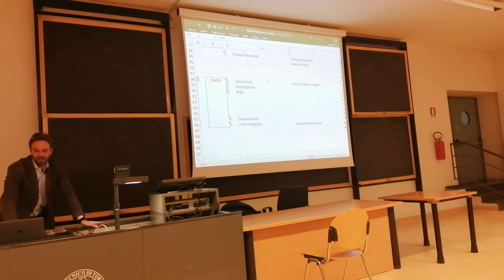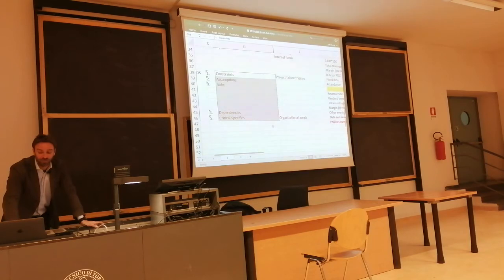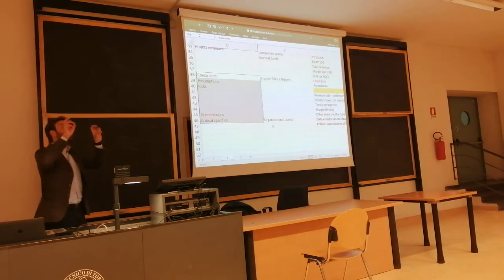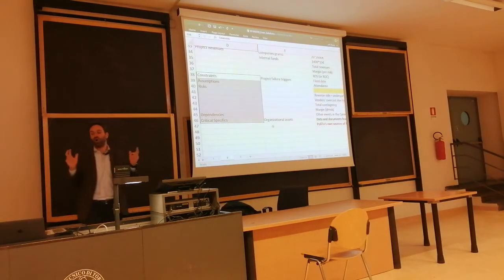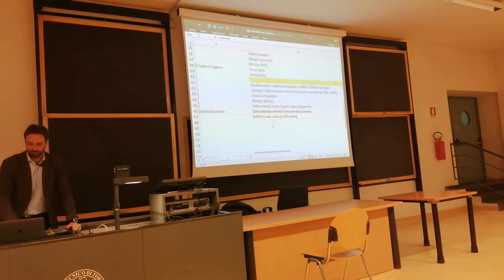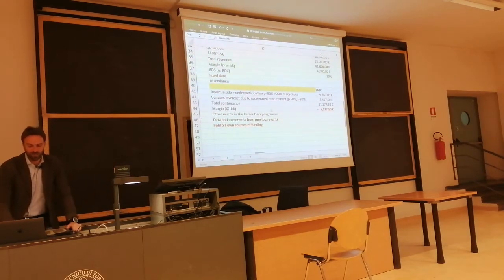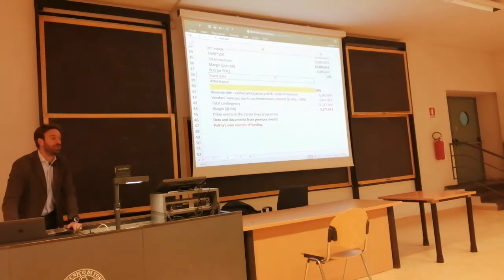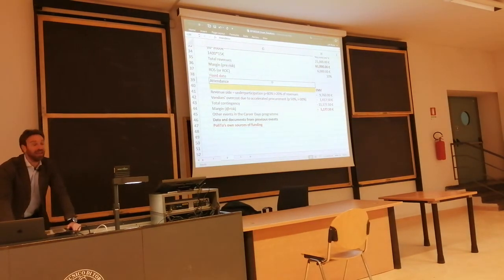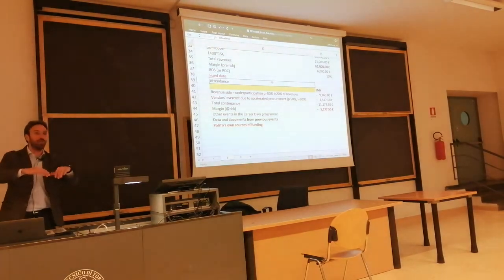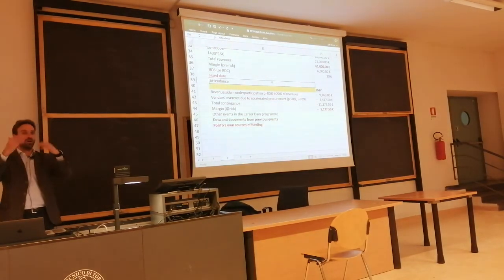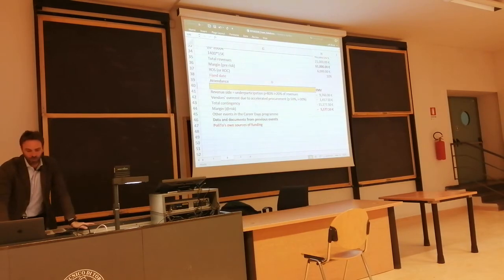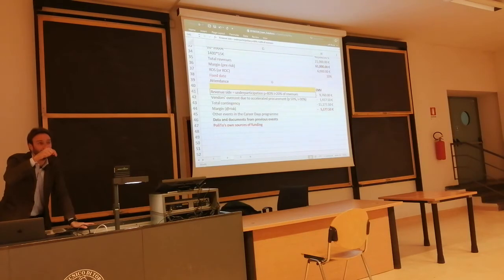And finally, all the constraints that we have with risks, dependencies, and interfaces, and the issues that we may incur, which is a risk analysis. What are the risks that we may face? Well, we are facing problems with the fixed date. We can't postpone the project. We may be failing in attendance, because a lower number of companies may be coming, so that our budget will not be met. So we may be having a revenue upside or downside, probably a downside.